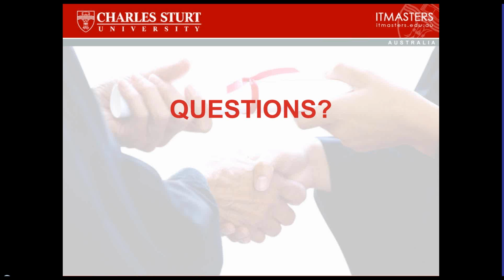Would you need separate Envision Vision data sheets for each release if you're working on a very large many-year project? That would be a good idea. If you're going to have a release, you need an Envision statement for that release. So you need to know what your goalposts are. So the project manager who's responsible for meeting the objectives of the release, they need to know their success criteria for that release. They need to know what's in and what's out.